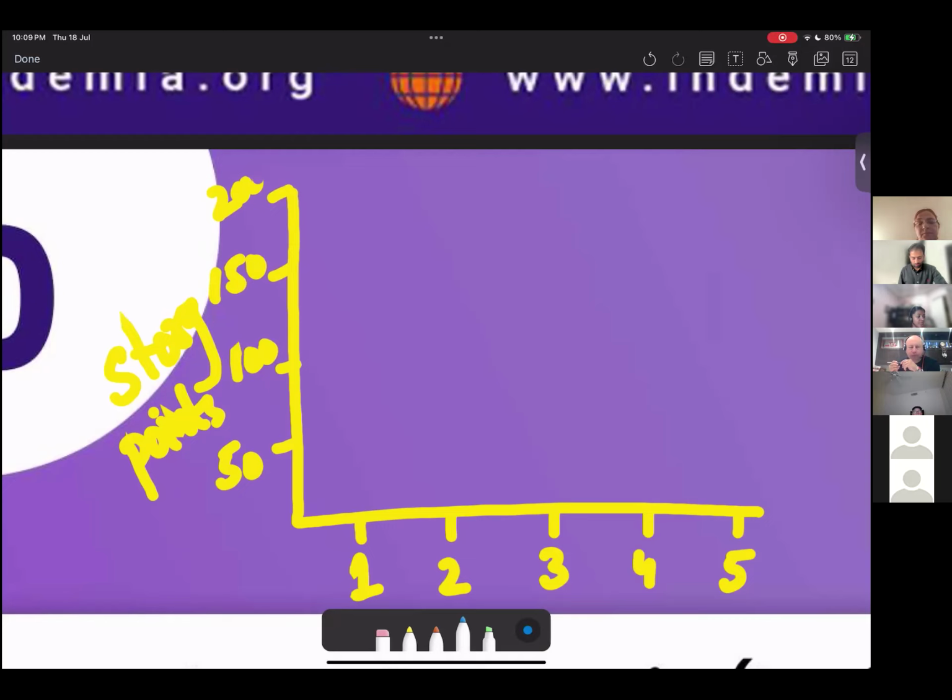First is you simply map how much work you have done. So what is velocity? Velocity is how much work you have accomplished in one iteration. So for example, I have completed 150 user story points, so I will be drawing a point here. In the next, I have completed 100. In the next, I have completed 200, then 150, then 100. So my velocity chart would be something like this, right?